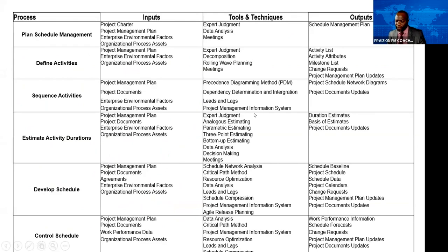That's it. We've talked about bottom up. Bottom up is going to the granular levels and adding them all up to the top. You can break a task down to even lower levels of subtasks and roll those up, or you could choose just to estimate a work package by going down to the multiple activity levels and rolling up all of those activities into the work package. That is also looked at as bottom up.